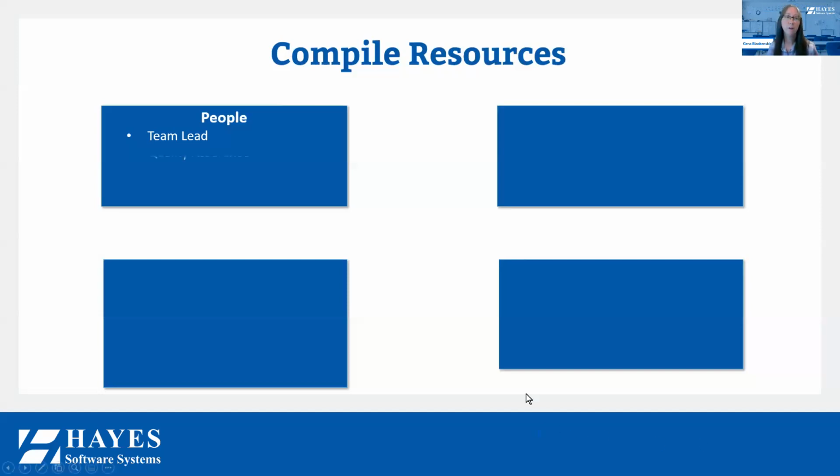Then we're going to have what I would call the actual scanning team, which would be the person that does quality assurance and the auditor. So 2 people per scanning team. If we have a large school, we might send 2 teams into that school and split the site. So say maybe it's a 2-story school. Team A is upstairs, team B is downstairs. Or it's one big school and we start in the middle and team A goes this way and team B goes this way. So that scanning team has an auditor, and that's the person who's carrying the scanner.